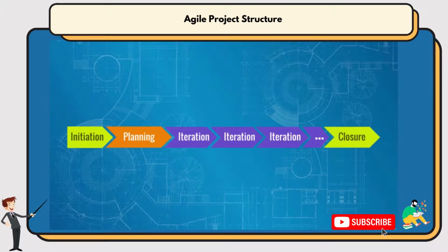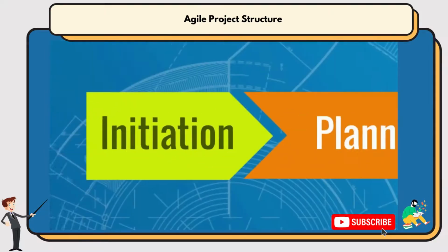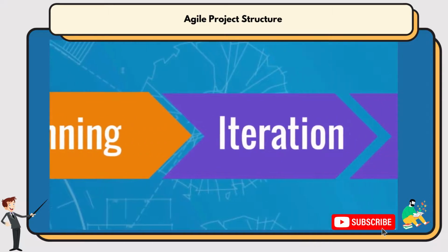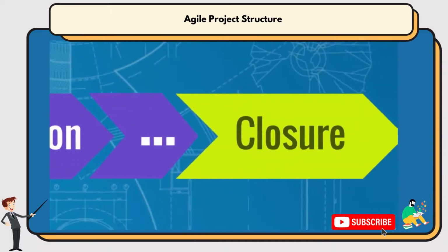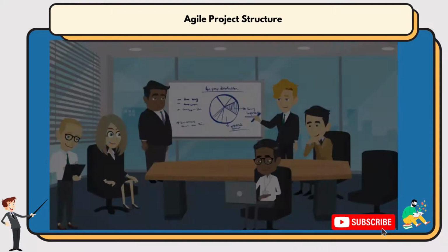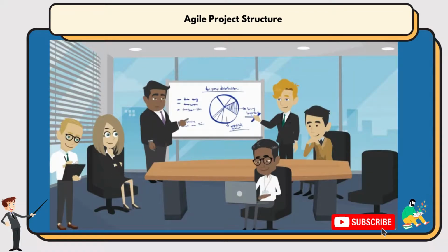Okay, to finish professionally, we must not forget to have a proper closure phase. This one will follow the same best practices which we are already familiar with. The only thing worth noting is that the lessons learned gathering is not performed only at the end, but after each and every iteration. The project team gathers to discuss what went well and what can be improved in the next iteration. Hence, lessons learned are constantly discussed and improvements implemented.